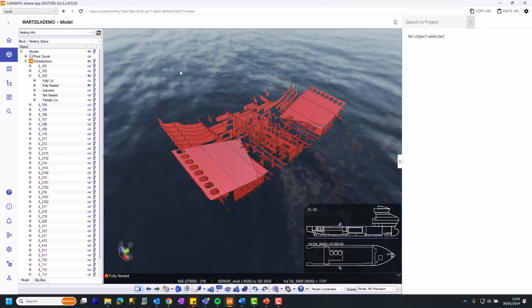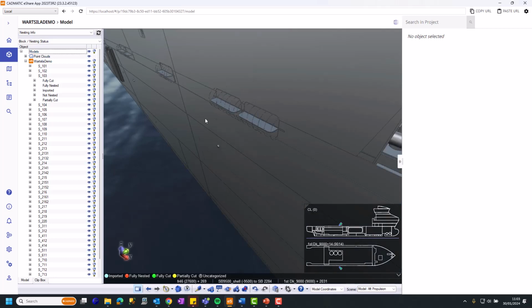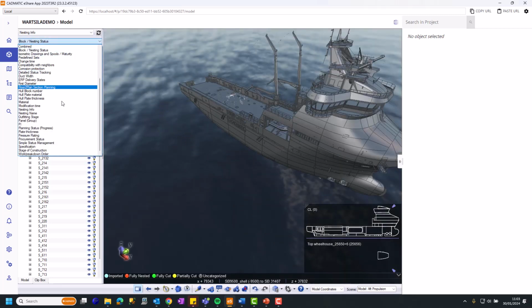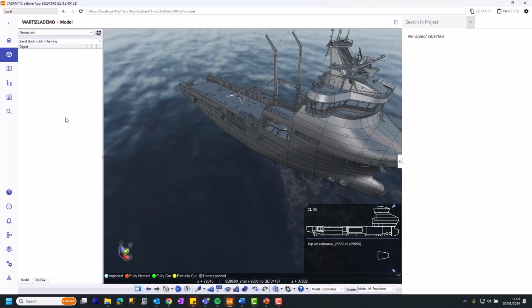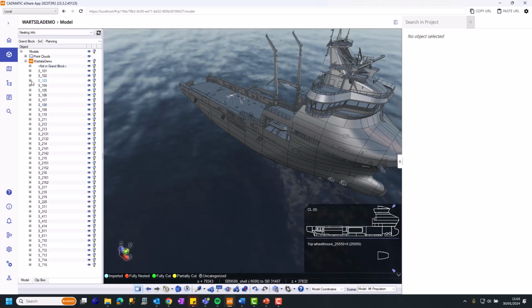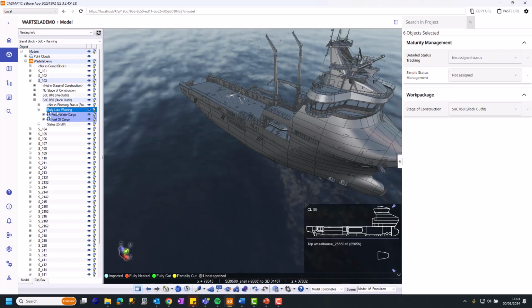And there are lots of more powerful examples of this once you start to, say, include ERP and perhaps planning information. So, for example, here we can look at blocks with various pieces of planning information. Our system is going out to build up that information. So again, we'll go into block 103. We start to have some building instruction in terms of work breakdown structures. And then we have some planning information. And we could see here we've got a category which starts to give us some warning on the late delivery of parts, say within the fuel oil system and the freshwater system.